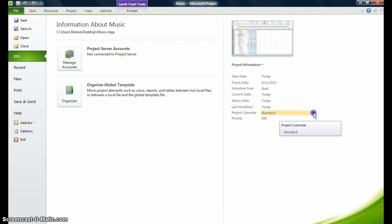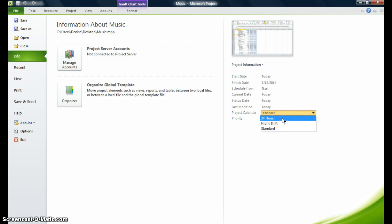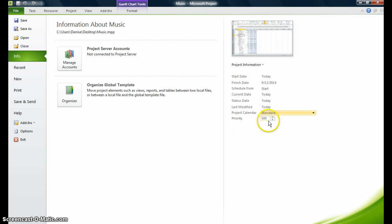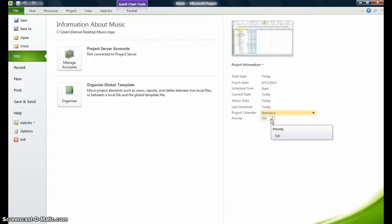My calendar, if I click on this more button, I have three calendars in project. The 24-hour calendar, a night calendar, and a standard calendar. For this particular project, I'm going to keep the standard calendar. Later on, I will show you how to customize your calendar. My priority is going to be 500. Even though in project you can prioritize your projects, especially if you're working on multiple projects. You want to make sure that you prioritize your projects. The priority is from one to a thousand. So the higher the project priority, the more attention the project will give to your constraints, to your project.